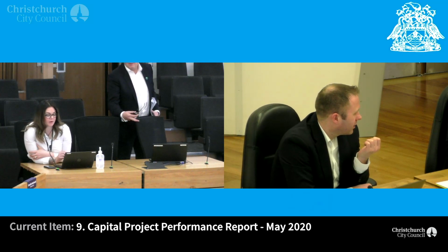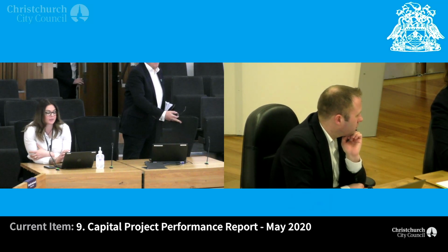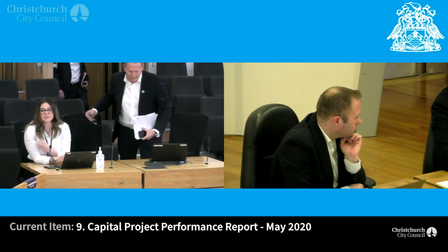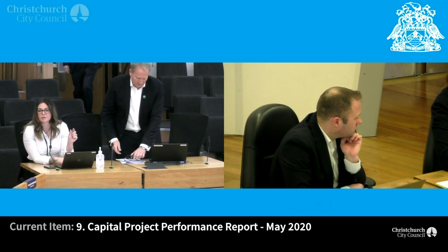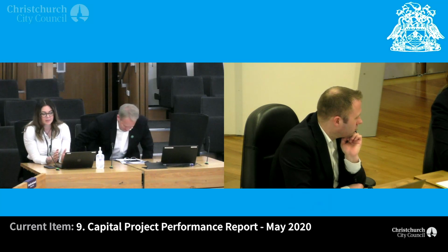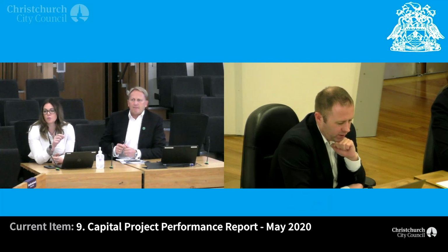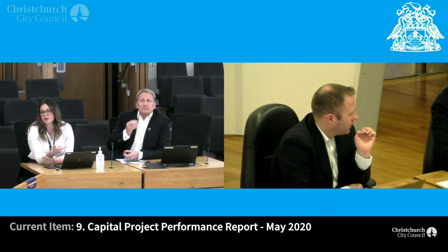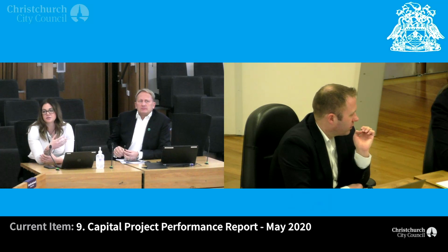Can I just say something around the format of the watch list: cost and time are now directly based on the exception. So it's in a range. If we're over budget, it's flagging red. If we're on budget forecasting, it's green. And all of the risk now has got its own column. So what you're reading at the moment, Yanni, is all just the risk associated with that project. It's not a current issue. It's not impacting on cost and time at present, but we do have to manage risks on our projects. If we don't, they end up becoming issues, and they do end up impacting cost and time.